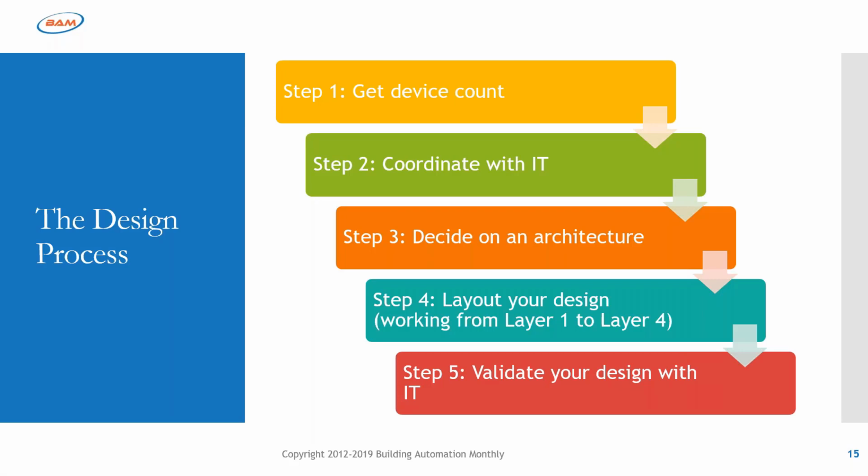Is the network coordination table to be created by the plan spec engineer or controls contractor? Controls contractor. I can't think of a scenario, except where there's a technology contractor who the controls contractor maybe is reporting to, where that network table would be created by anyone other than the controls contractor.